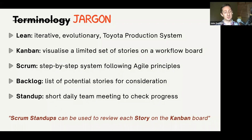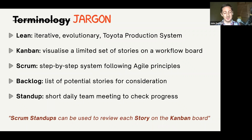Scrum talks about the backlog — all the things you might want to do but haven't necessarily authorized yet. Then there's the stand-up: short daily team meetings to check progress. Although most teams do stand-ups wrong — they talk about what people did yesterday. I think you should be reviewing your Kanban board, looking at where all the stories and items are, and then the relevant people can speak to their progress, blockers, and what's going on.